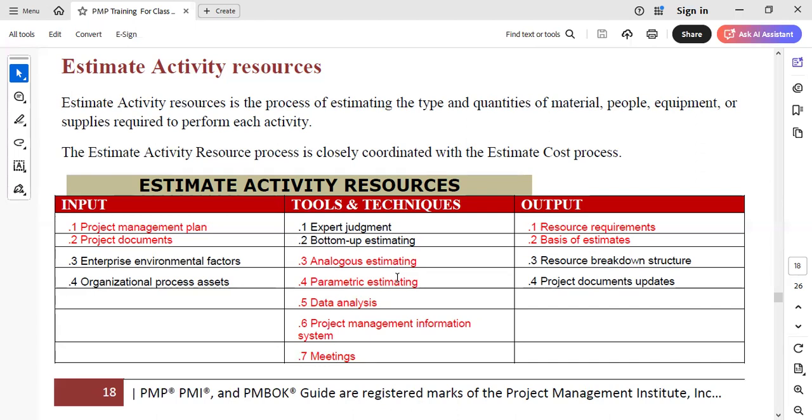But when you are making an estimate, like I said, always come up with your basis of estimates. The basis of estimate is like your own assumptions, the reasons why you say it should be 4 or 5. You want to give your reasons, because if you don't present that, someone may be thinking 3 should be enough. Whereas you could have considered the terrain and identified some peculiarity that may take more or less. That's the reason why you're coming up with the figure which you have. So the basis of every estimate must be specified.